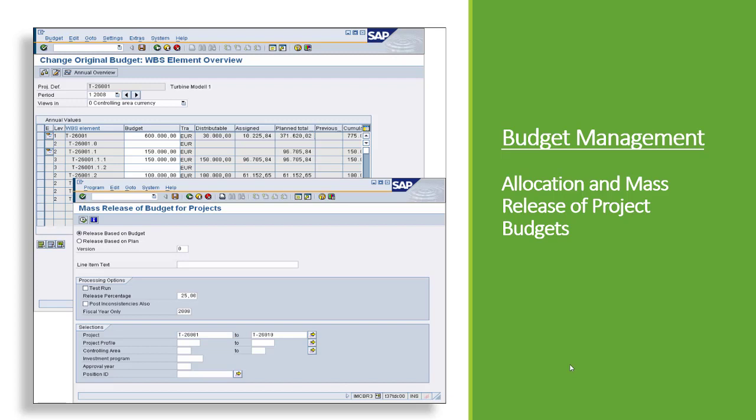Budget management. Budget is the approved cost structure for a project. You can allocate budget to projects in investment management or directly in the project system. Budgets can also be distributed hierarchically within the project structure. If required, you can successively release budgets and post updates such as budget supplements or returns. Budget availability control enables you to control cost actively by issuing warnings and error messages when tolerance limits of the budget are exceeded because of assigned values.